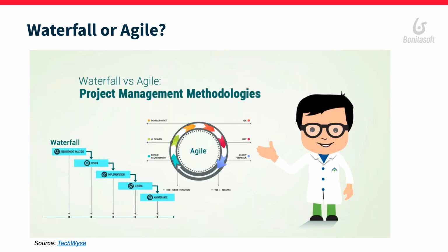I don't remember if it was Aris or another tool, but they designed the process and then implemented it in Bonita. It took more or less 2 or 3 months. And when they showed the process to their customer for testing, the customer said, actually, we thought it would be better to do it this way. Okay, back to the first step. They had to change all the requirements and start again with all the design and implementation, because as Bonita has dependencies, as you have different layers, they had to redo everything, and they lost a lot of time.